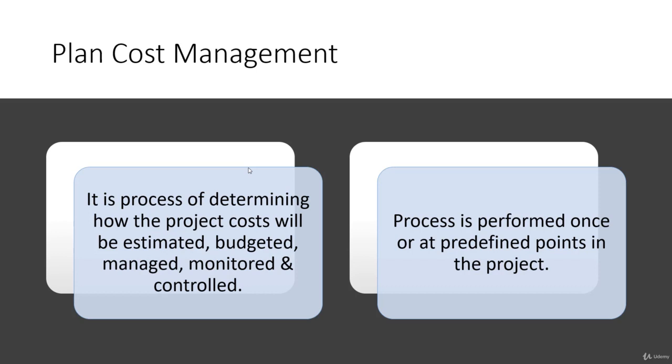Here you are developing a plan to address the funding, the estimation, the money side of the project. When you estimate a project, you look at all kinds of cost, including human resource. If it requires an effort of 40 hours, you will have a billing rate, which will be the cost per hour or per day, or fixed cost resources.